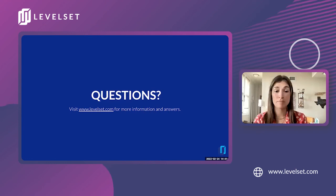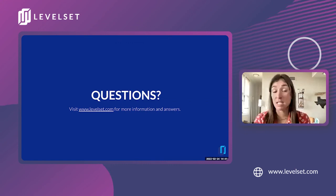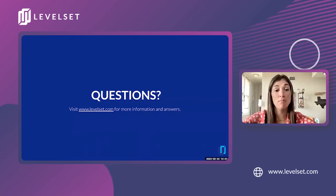And let's see, I see one that says, do you require amount on your notice? So again, some of that might vary state to state depending on the notice requirements. Typically, it's a little bit further down in the process when you're not paid. You want to send what we call a notice of intent to lien, which is a document you send when you actually have had an invoice come due. Most states require attaching an invoice and having the exact dollar amount on that.